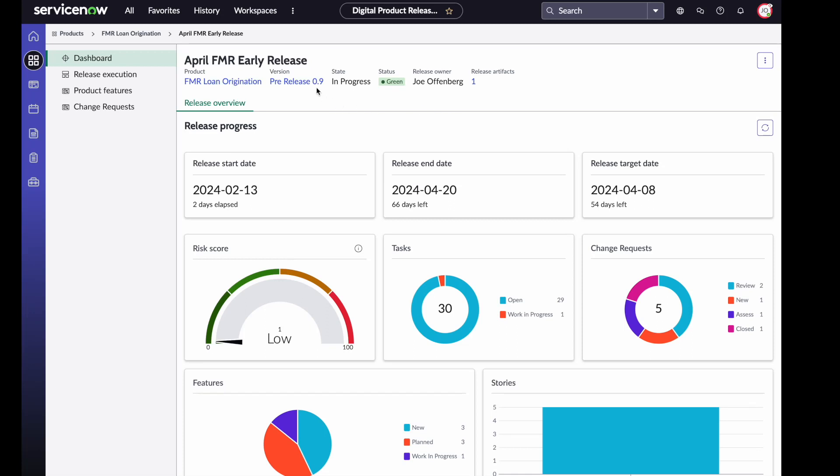Now I am on the release dashboard where I'm looking at the details for a particular release. This release was for the 0.9 version of our FMR product. It is currently green, and we can see things like our start date. This release started just a couple of days ago, and its end date is toward the end of April. But we also have another date here, our release target date. This is the date that we are trying to have our policies validated by in order to say that we are ready to release. If you have a deployment that might go on on the 9th or 10th, you'd want to have that go-no-go decision before that deployment date.